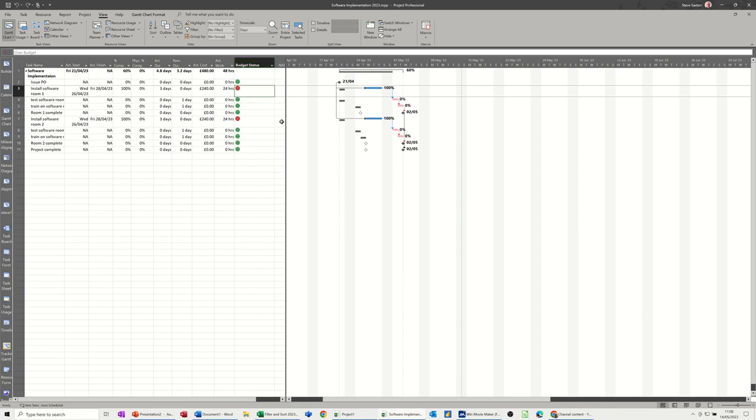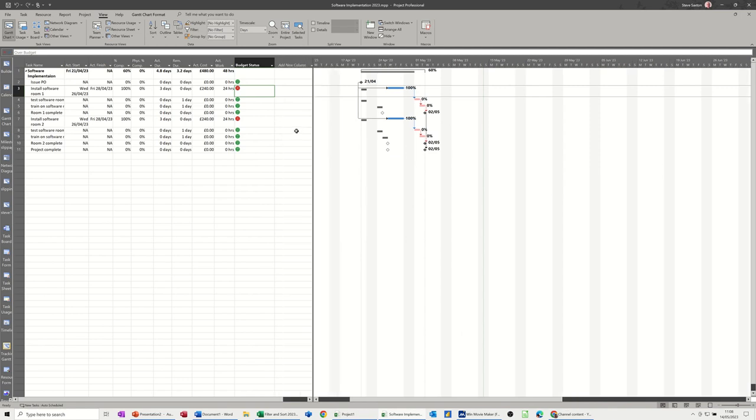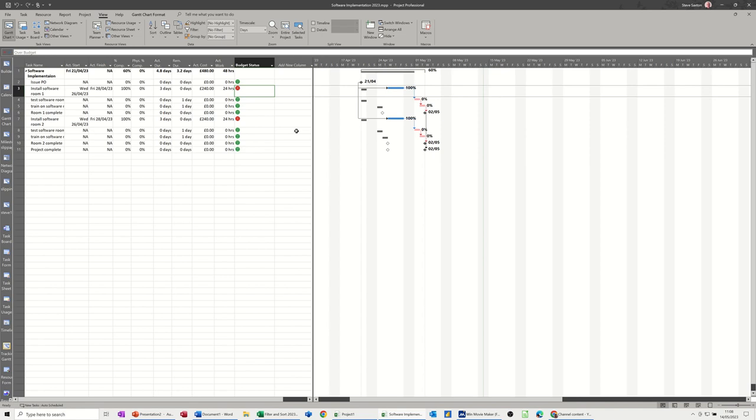Now to create the traffic lights, let's say if it's over 75% complete, you want it to show green or 100% green, over 50% yellow and then less than that red. Or you could have it where not started could be a particular color, over 25% or up to 25% could be red, up to 50% amber, and then after that it's green. Totally up to you.